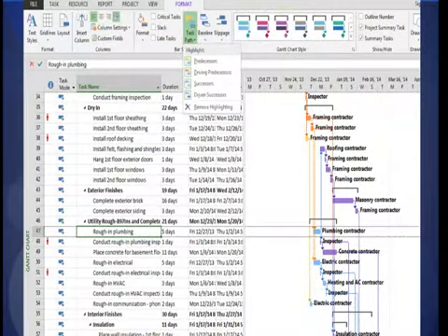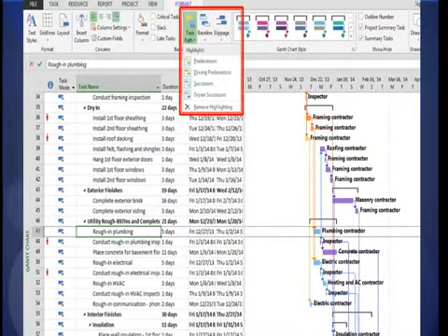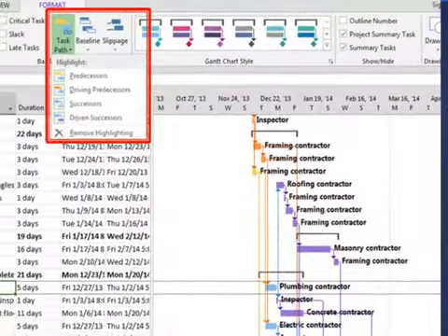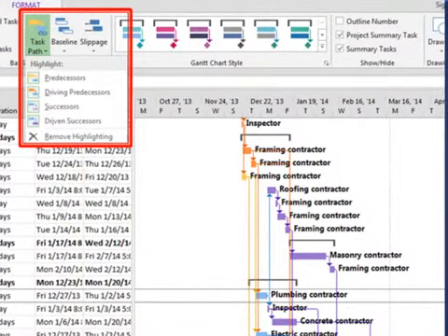One of the nicer features in 2013 that is new is the Task Path feature that appears for the first time in 2013. So to add to the arsenal of figuring out which tasks are driving your project schedule, Project 2013 has added this feature to allow you to add color definition to the affected tasks. As can be seen in this drop-down slide, you have 4 options for coloring the active task, and you can select none, 1, 2, or all of these to highlight.